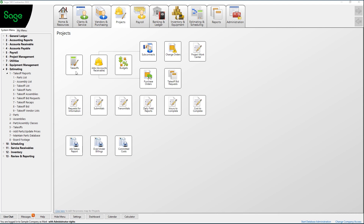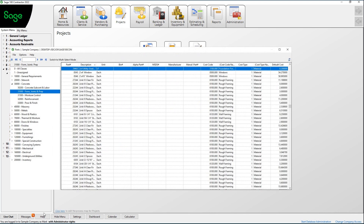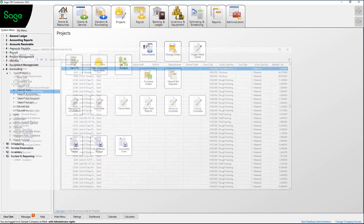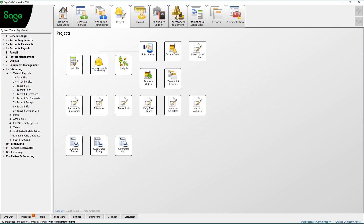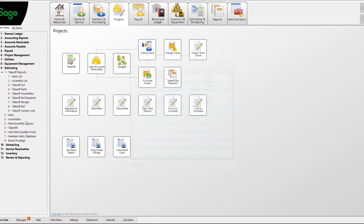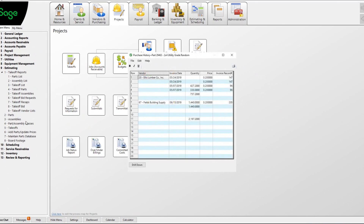Sage Basic Estimating is one of the built-in modules available with Sage 100 Contractor. It's unique because of its common database that's used throughout the entire process — from estimating to purchasing to inventory control and allocation to the job. This also provides a very easy way to upload parts and pricing to a database, maintain the pricing for multiple vendors, and track historical pricing of particular parts.